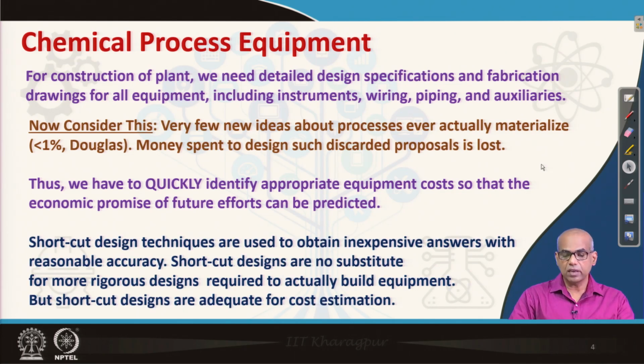Shortcut design techniques are used to obtain inexpensive answers with reasonable accuracy. Remember that shortcut designs are no substitute for more rigorous designs required to actually build equipment. Shortcut designs are adequate for the purpose of cost estimation.